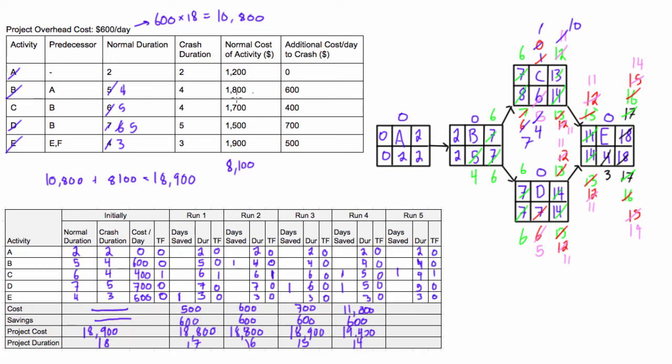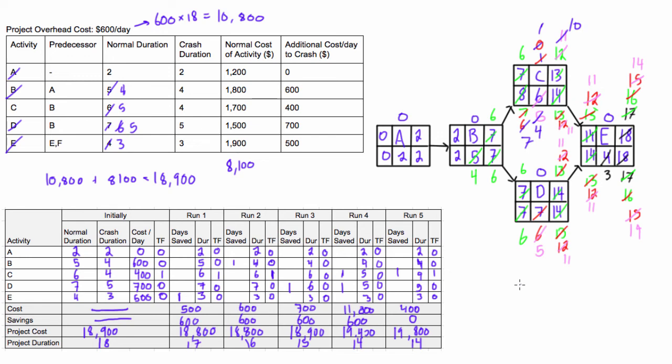And we would have spent, crashing that, we would have spent 400. We would have saved $0 because the duration didn't change. So we're not saving project overhead for any days. And then we'd have $19,400. Now we'd have $19,800. And we're still at 14 days duration. So as you see, there was actually no help in doing that last iteration there. Or that last crash.